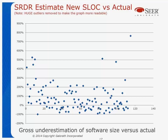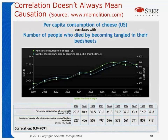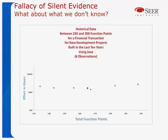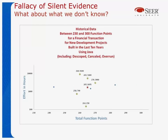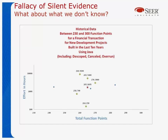Ways to mitigate that are to look at actuals and look at the differences. There's also the issue of correlation. This shows the correlation of per capita consumption of cheese in the United States and the number of people who died becoming tangled in their bedsheets — a 0.94 correlation, which is really good. The only trouble is there's no causation. Cheese and bedsheets don't go together. We need to be careful when looking at models and estimates as well. Here's an example: the red point is historical projects between 230 and 300 function points for a financial system built within 10 years. If we look at just the successful projects, it doesn't look so bad — but if we include projects that were de-scoped, canceled, or overrun, we have more suspicion. We need to be careful of people cherry-picking the data.